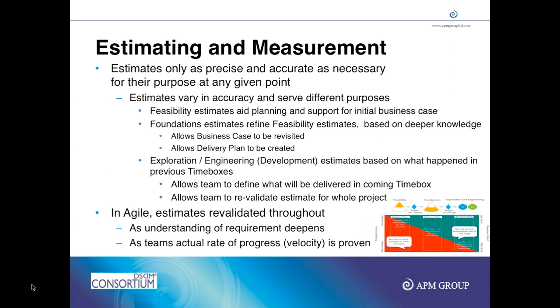At the end of the second time box also, you got around 30-35 story points completed. In the third time box also, you completed about 30 or 40. So well, okay, 20 was very modest. Our average is coming out to 35. Then you start using 35 as the story points to revise when the project will complete. You keep looking at all these things. If yours was on a very high side, then you start taking it at the lower side. So well, okay, must have, should have, could have, how I'm going to prioritize.